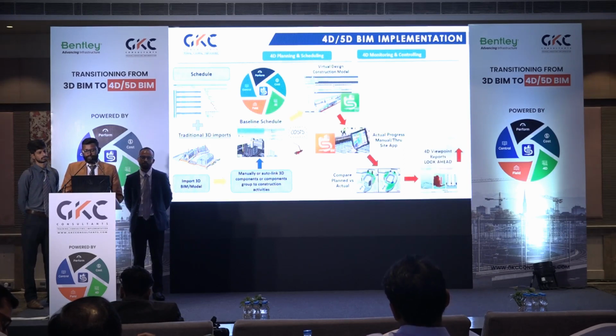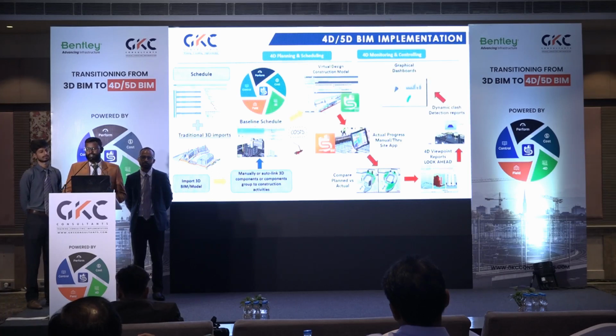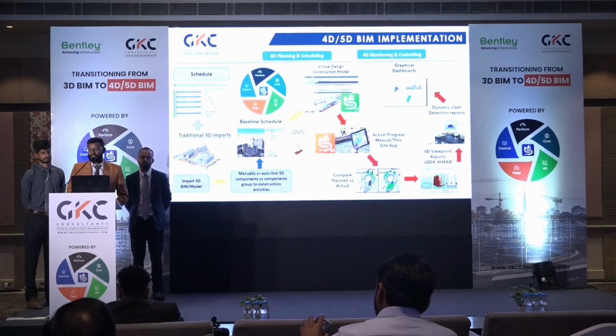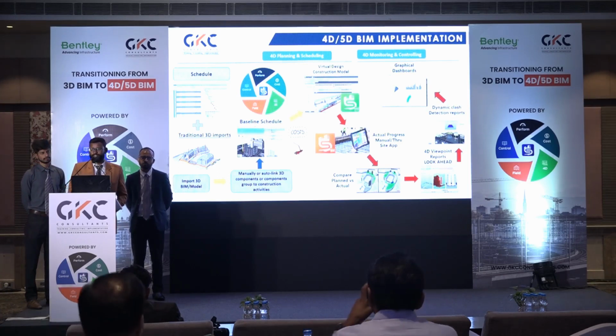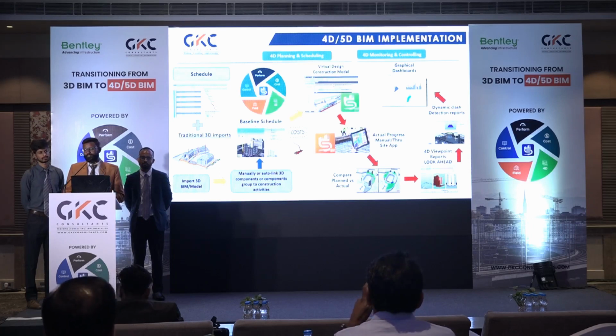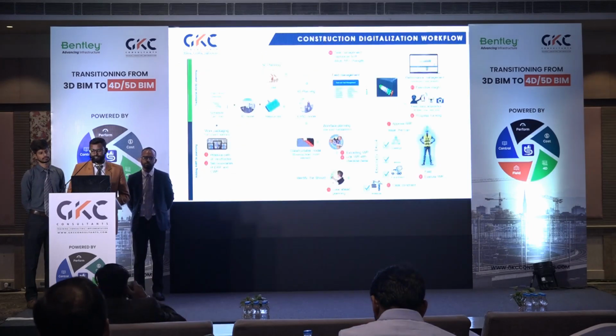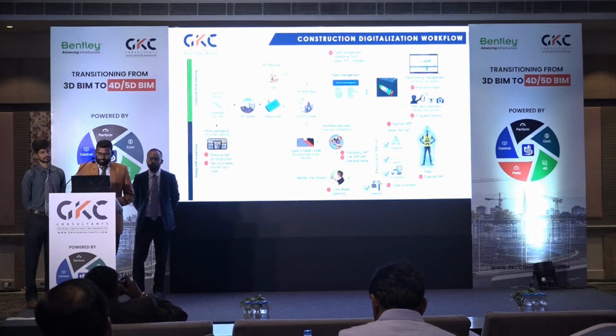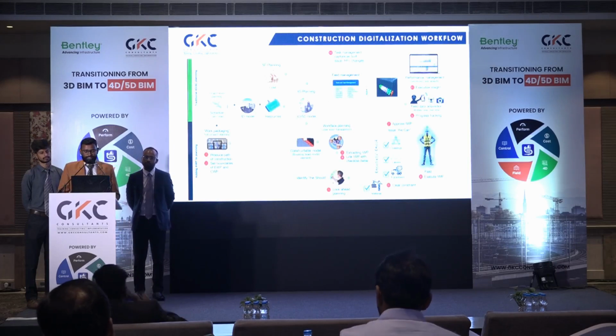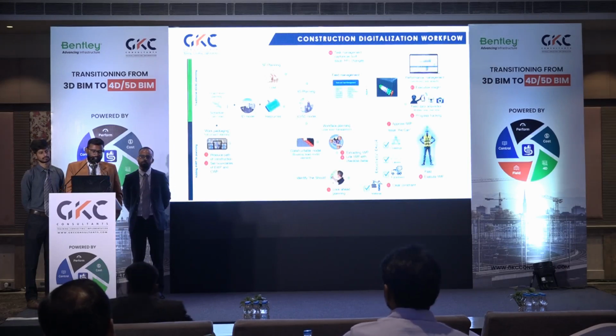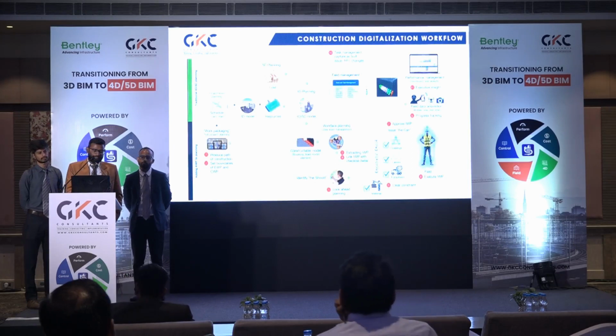From that, we can plan our look-ahead plan and dynamic clashes, and visualize the data in a graphical dashboard. Suppose some concreting is going on: from the total quantity, we can show how much quantity has been incurred, in the form of graphical dashboards. This was briefly covered by our colleague. So this is the normal workflow up to 4D and 5D.